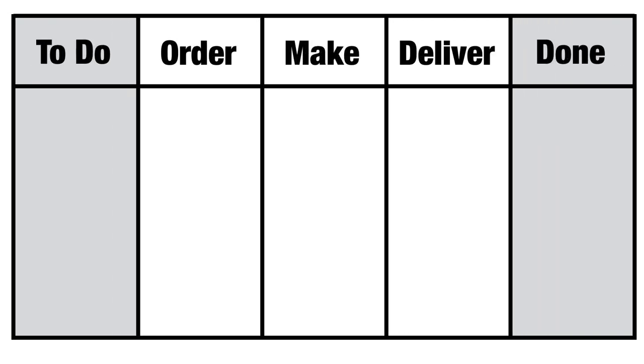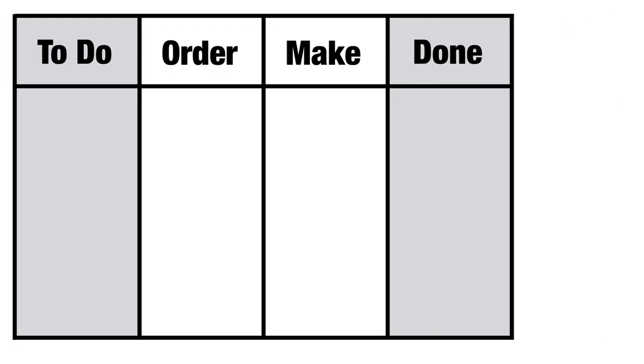To-do, take order, make coffee, deliver coffee, and done. Now I come to look at this again, I'm not really sure that deliver coffee merits a separate column — although deliver coffee would be an excellent definition of done for the previous stage, making coffee. So making coffee is done when the coffee is delivered — or at least slammed down on the desk with some version of the name shouted across the room. Let's squash those two back together, leaving us with two value-adding columns.